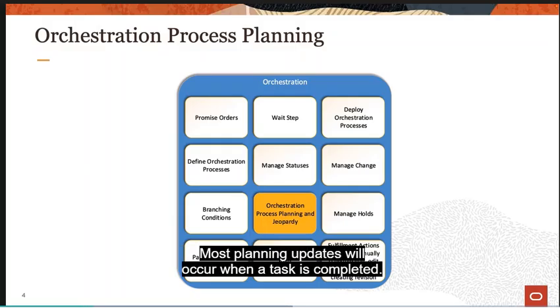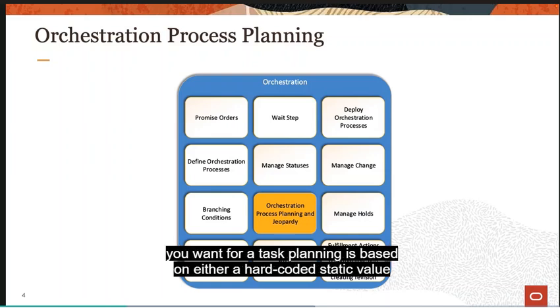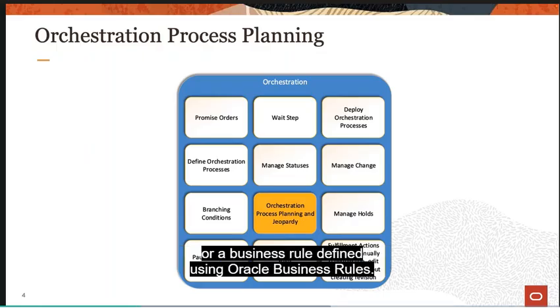Most planning updates will occur when a task is actually completed. The planning service will automatically manage the calculations based on the conditions and rules you provided in setup. For example, you can configure that the lead time you want for task planning is based on either a hard-coded static value or a business rule defined using Oracle Business Rules.